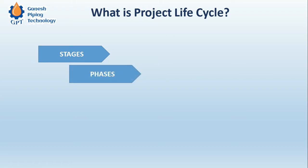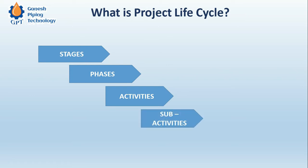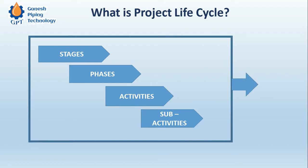Any project is nothing but a series of events. A project is divided into a number of stages, those stages are divided into phases, and those phases are divided into activities and sub-activities. A set of sub-activities constitutes an activity, a set of activities constitutes a phase, and a number of phases constitute a stage.